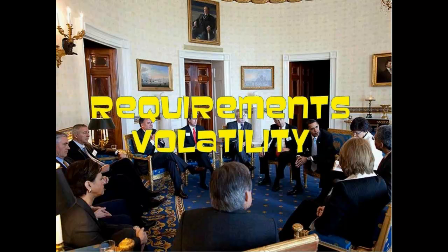You had a Supreme Court case that nearly invalidated the whole Affordable Care Act. You had states, one by one, falling out from participation with their own healthcare exchanges and relying on the federal government. So requirements volatility was extreme, all of which would, of course, lengthen the project.